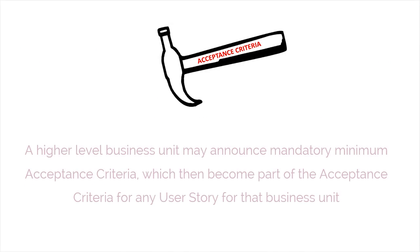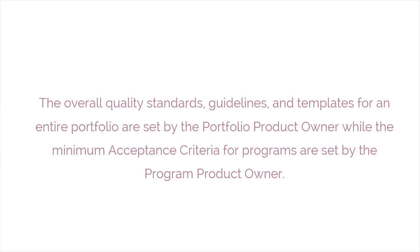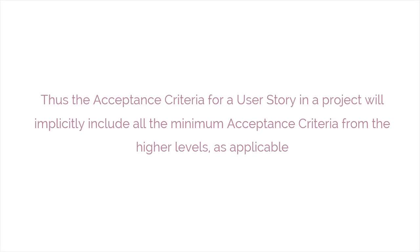A higher-level business unit may announce mandatory minimum acceptance criteria, which then become part of the acceptance criteria for any user story for that business unit. Any functionality defined by the business unit must satisfy these minimum acceptance criteria if it is to be accepted by the respective product owner. The introduction of this acceptance criteria may lead to a cascading set of acceptance criteria for the portfolio, program, and project. The overall quality standards, guidelines, and templates for an entire portfolio are set by the portfolio product owner, while the minimum acceptance criteria for programs are set by the program product owner. Thus, the acceptance criteria for a user story in a project will implicitly include all the minimum acceptance criteria for the higher levels as applicable.